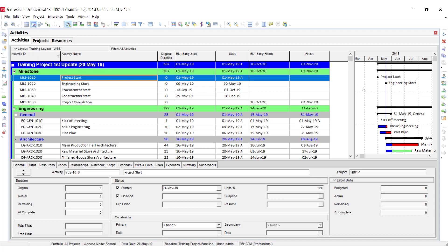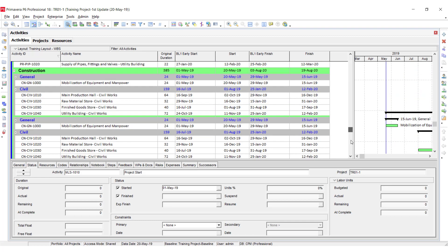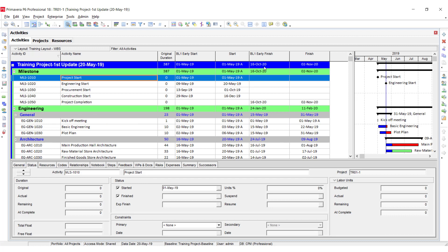You can see the difference between the baseline and the actual progress update. At the top level, you can see that our baseline project finish date was 16th October, but as per the update, our project is expected to be completed on 2nd November.